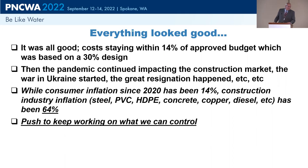We were pretty proud of ourselves when Muriel and I put together the abstract for the conference, but that was a few months back, right? And a few things have happened since then, namely the war in Ukraine and the impacts that it had on the energy markets and particularly the stainless markets. Although we were still holding pretty close to budget, 14% over where we were at the 30%, we started seeing that the materials of construction were looking at like a 64% growth over that same period of time. So in about a 9 to 12 month window, we were seeing our materials prices going up substantially.